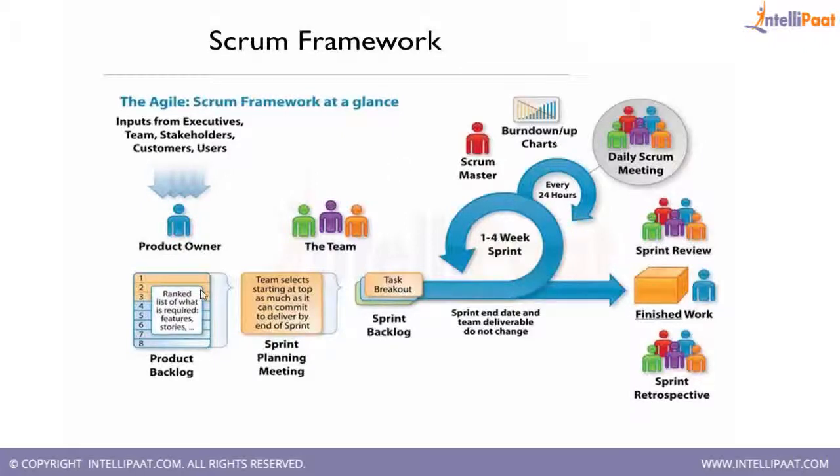So we saw this product owner is generating a prioritized list of product backlog items. He is giving this to the team and discussing with them to understand what this team can deliver in one sprint, in this fixed time box of, let's say, 2 weeks. Let's choose that. 2 weeks is generally the most optimum size of a sprint and the most preferred one. But you can still have 1 week, you can still have 4 weeks. Certain teams also have it for 6 weeks. So let's say we have chosen 2 weeks, and what are they doing?